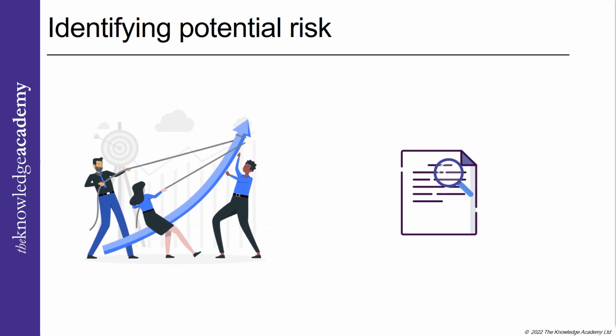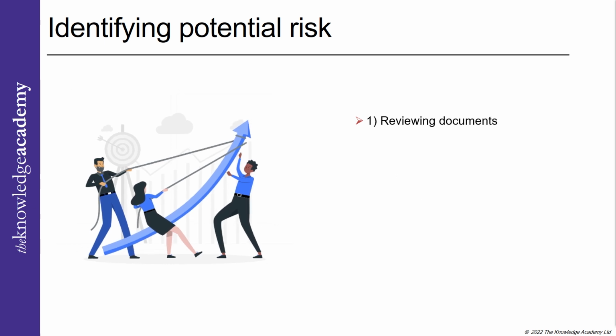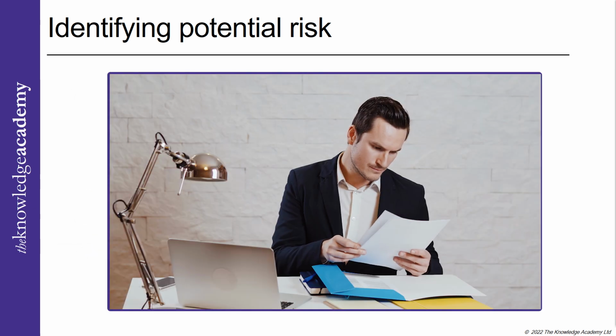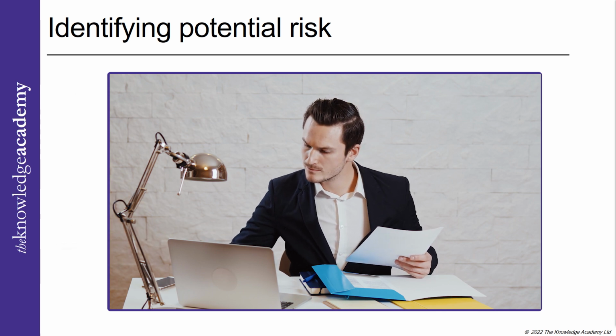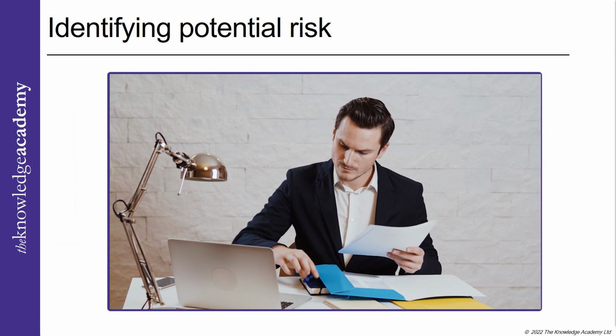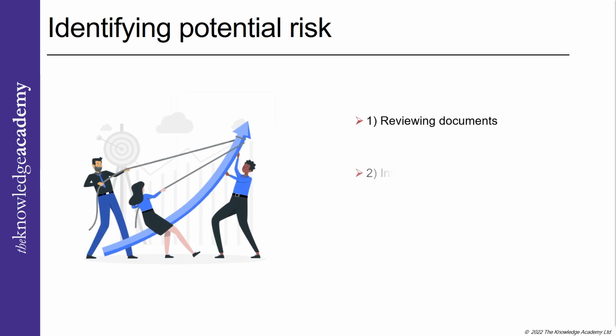Several methods for identifying risks include reviewing documents. Careful review of the documents from previous project records like lessons learned, risk register, issue log, and project files. This will help you detect any potential risk in the current project.